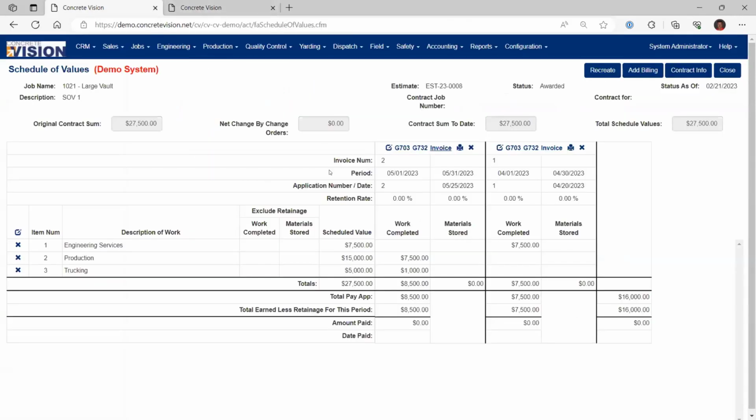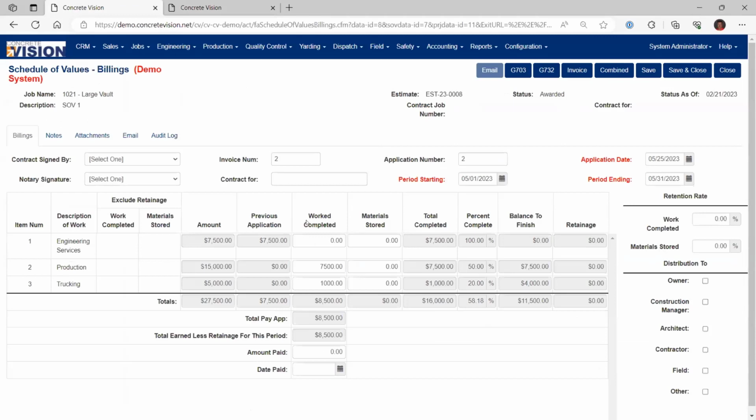Real quick, Dan, can you enter a percentage instead of an amount? If you say had 50% completed, could you enter that 50% completion, or do you have to type in the 50% amount? Currently, on our first go through of this, we've made it a very manual, non-calculated process. So you physically have to type in the amounts, and then you'd have to physically type in the amount that you want to show up in here.